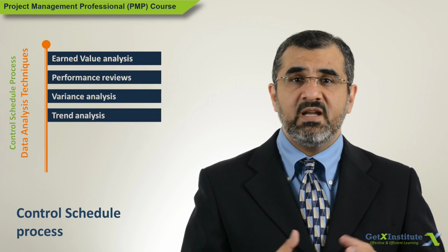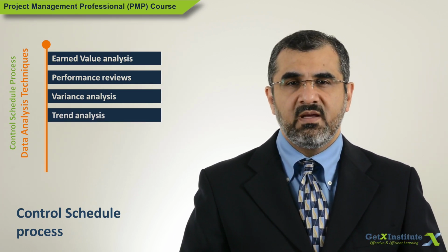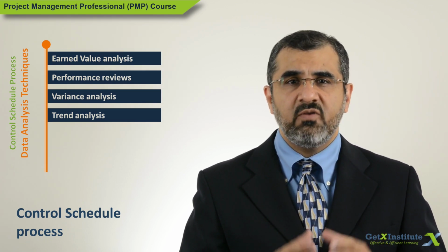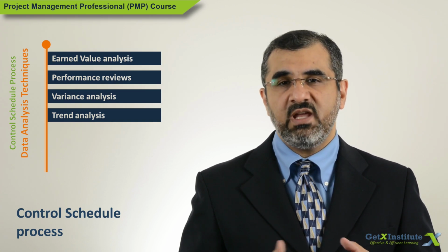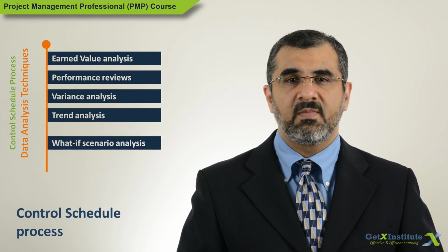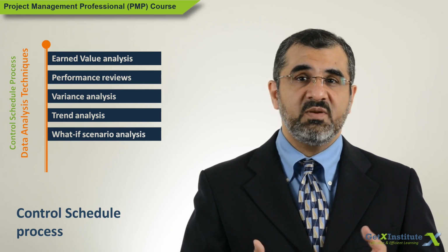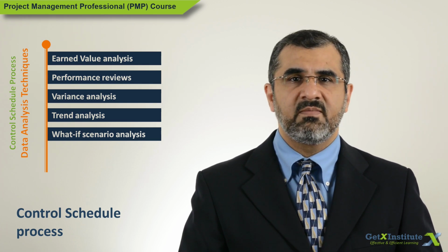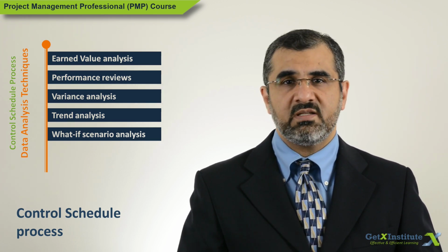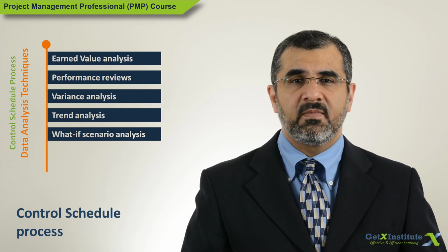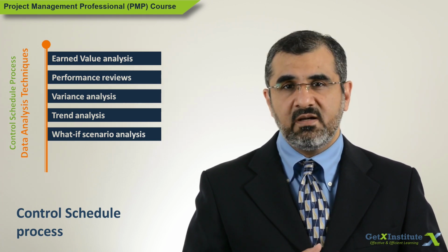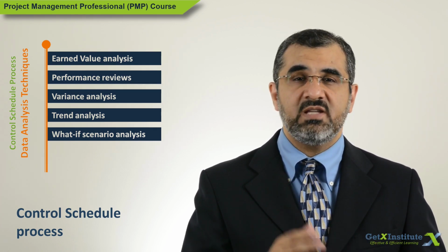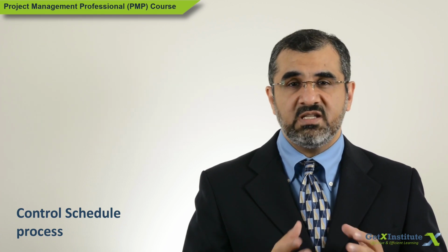Trend analysis evaluates performance over time. Is schedule performance improving or deteriorating? It is a great way to identify areas that need attention before they are in trouble. What-if scenario analysis will also be performed due to changing factors like new risks or modified risks, and then evaluating the impact on the schedule. All these analyses can result in a change request to modify the schedule baseline if the current schedule does not look realistic and achievable anymore.